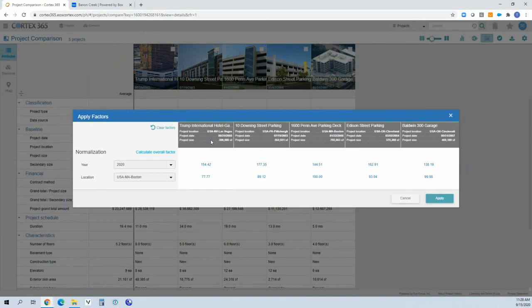And it's important to note that those fields that are associated or attributes with any of the projects are the baseline or the basis for those factor tables. So typically when you publish, those are going to be required fields. Somebody publishing a project just can't leave those blank, or that lets the system sort of fall apart. So part of the configuration is making sure you're defining fields that are required for publishing.